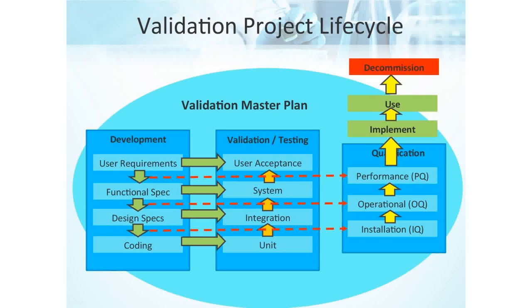After that, the installation qualification test scripts are run to prove that the design specs and integration were successful. And I mentioned the note IQ, and Kristen, maybe you can help with this. I love how you have drawn out that the development cycle is in a downward trend, but then validation testing is up. Yet there's a parallel, or correspondence, that goes all the way across, that you've got the coding, unit tested, and IQ.